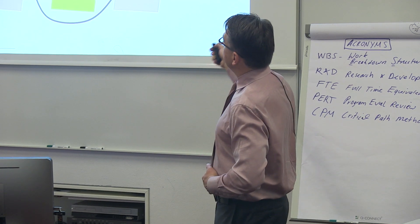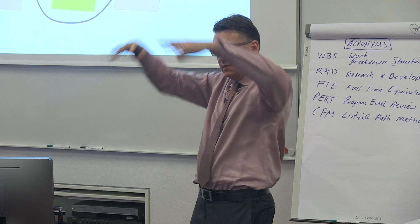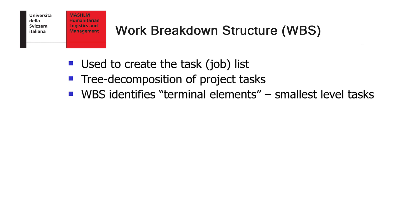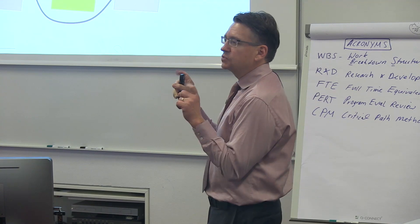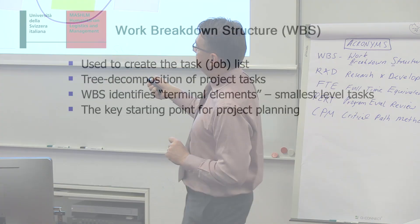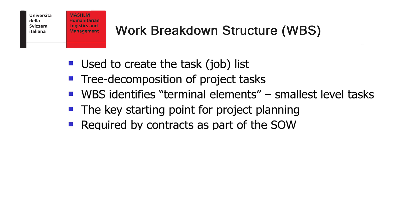The work breakdown structure, or WBS, is used to create the task list. It's essentially a tree decomposition — it has a root and then it branches out into project tasks. The WBS identifies the terminal elements, which are the smallest tasks you're not going to decompose any further. It's the key starting point for project planning, and it's often required as part of a contract or a statement of work.